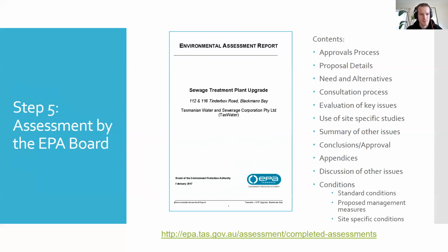And one of the biggest challenges for this project was that you were taking an old treatment plant under an old monitoring system. You were then changing the treatment plant, and you would have to transition them from an old monitoring program through a transitionary one into a new monitoring plan. That took about 3 weeks of my time working with the consultant to make sure we had a system that transitioned this treatment plant, because the new stuff would be built, then commissioned, and then transition to a new system. So really quite a complicated process. And the engineers, I don't know how they worked out how they were going to do it, but they did.